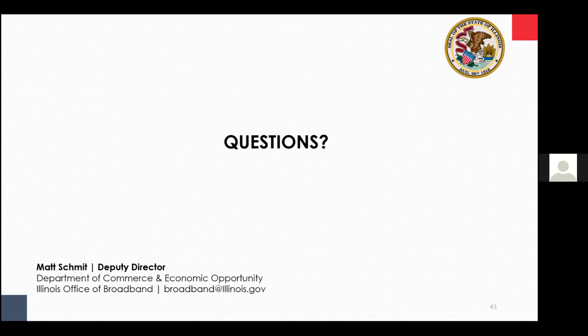So we've encouraged applicants to include that broadband infrastructure, broadband equipment, and telecommunications equipment, in addition to some equipment for remote learning or telehealth. Specifically include that use budget information for telehealth or remote learning, but don't include it in the 50% state grant amount that you're seeking. Include it in your non-state match.